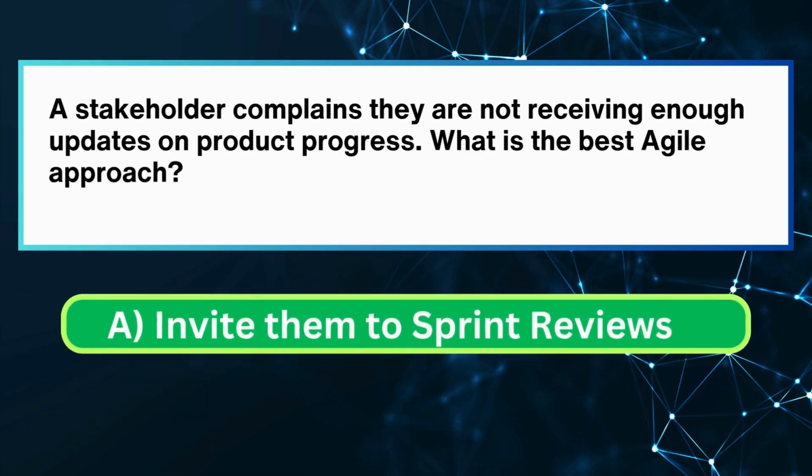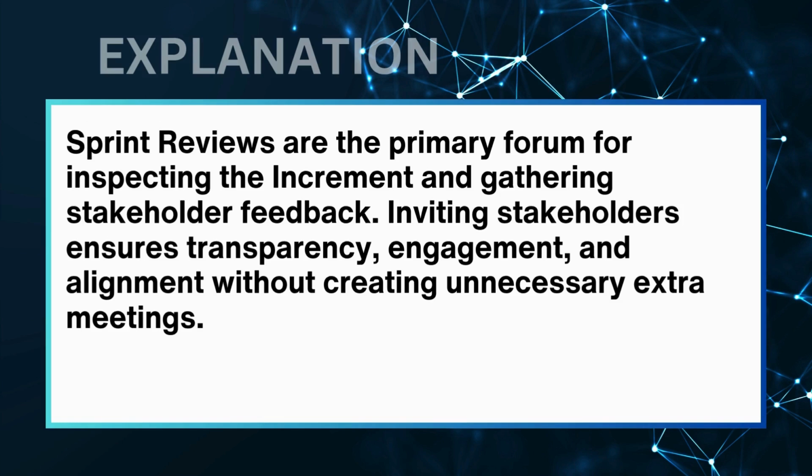The correct answer is A. Invite them to sprint reviews. Sprint reviews are the primary forum for inspecting the increment and gathering stakeholder feedback. Inviting stakeholders ensures transparency, engagement, and alignment without creating unnecessary extra meetings.